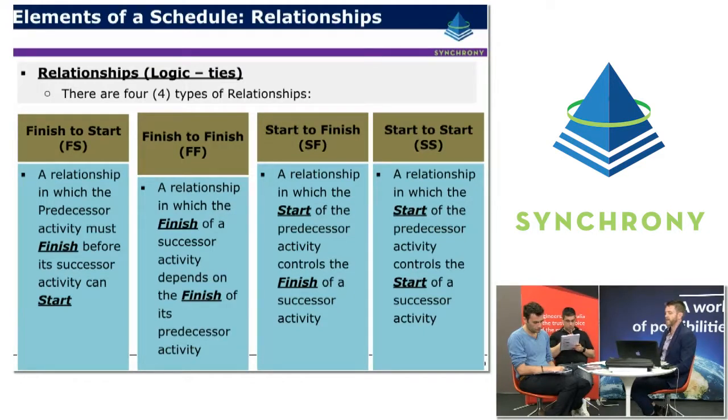So that's a very unusual type of relationship that might be rarely included where there's some form of overlap that might be required between 2 different efforts. For example, there might be a security team on site that are engaged that have a requirement that they can't leave until the new team arrives or something like that.